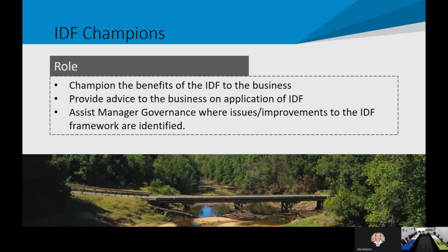So we told them in the training last week, and you did an awesome job, yeah. We told them it would go through CIS: the initial opportunity brief to get feedback on whether or not there was appetite to progress a particular opportunity. And would that then go to a general meeting for resolution? Yeah. So if there's full appetite there, then that's effectively gate 0 approval and away we go.